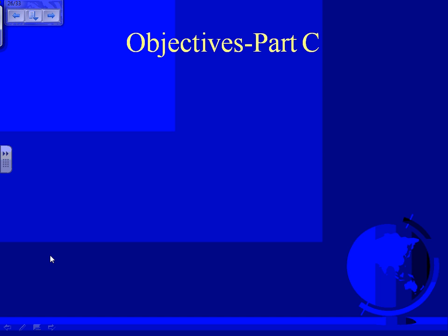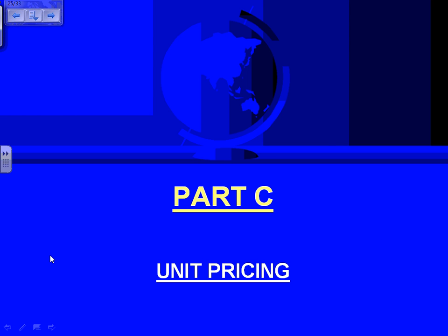Part C, guys, talk about unit price. Unit price. Let me tell you how simple that is. A unit price, guys, is as simple as this: you're a developer, Jackson. Your company is making a development in the city of Lakeville, for example, and they're going to build 25 residential units. And I'm going to bid them based on a unit price of, electrically speaking, $9,000 a unit. Unit price.